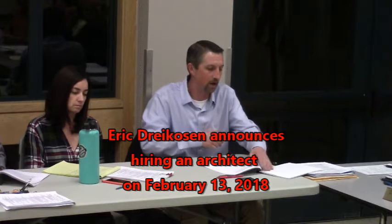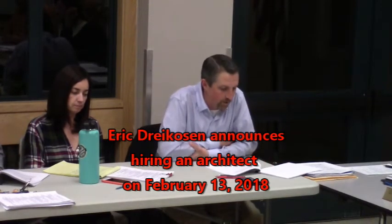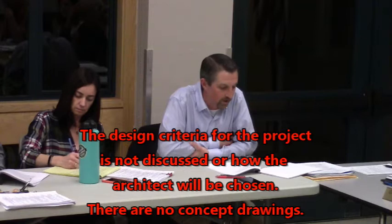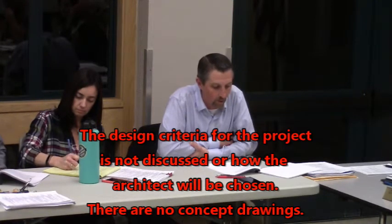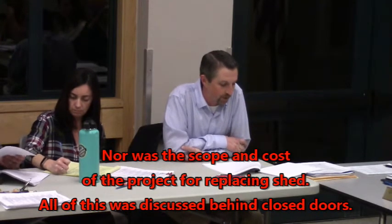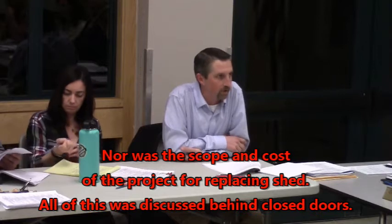And then finally, on the park maintenance facility replacement initiative, we keep moving forward there. I'm in process and basically just a signature away at this point, entering into a time and materials agreement with an architect who will put together some initial schematic design in cooperation with us. Part of the agreement is also putting together everything that is needed to submit our site plan review application so that the county can issue a formal opinion on the site, on the location, on everything else that goes with it.